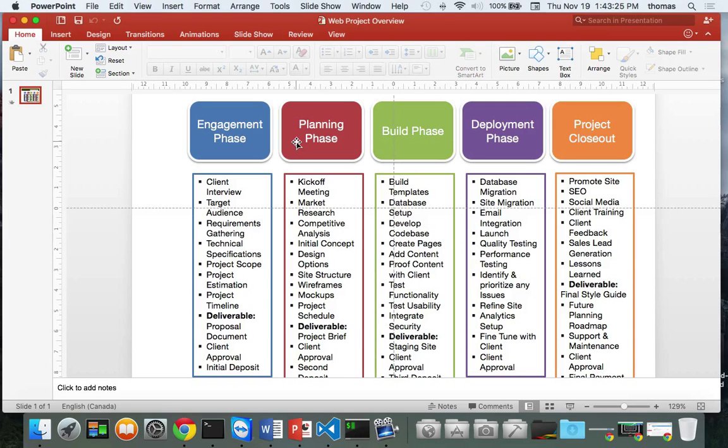There might be research involved, and what we normally do is charge the customer for the research, right? Even though you might say, well, wait a minute, you don't know how to do it, how can you charge a customer? But the reality is, everything I do is custom work, right? So there's going to be something I don't know how to do or haven't done. So I'm going to estimate how much it's going to take to figure it out, and I come up with a number, right? Like I said, an estimate.